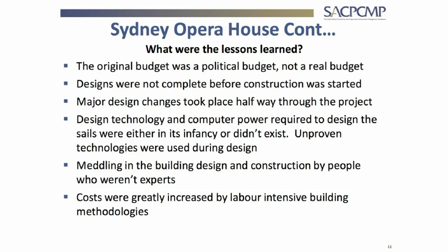So if we say, well, we're going to weld X amount of inches and our defects are going to be less than 2%, etc., because we think that out of the, let's say, 10,000 skilled welders we have in our country, we are going to get 5,000 of them, then the question remains from a risk point of view, how sure are we we're going to get 5,000 of those guys? So how realistic is your schedule and your costing, done to what we know at this point in time and what we have at our disposal?